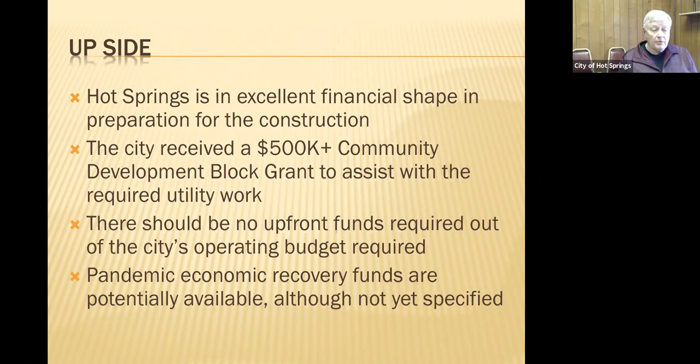The city also did receive over $500,000 in a community development block grant to assist us with the required utility work. That's a big bonus to us and provides some wiggle room for financing during the construction. There should also be no upfront funds required out of the city's operating budget to get the suspended sidewalk project started.